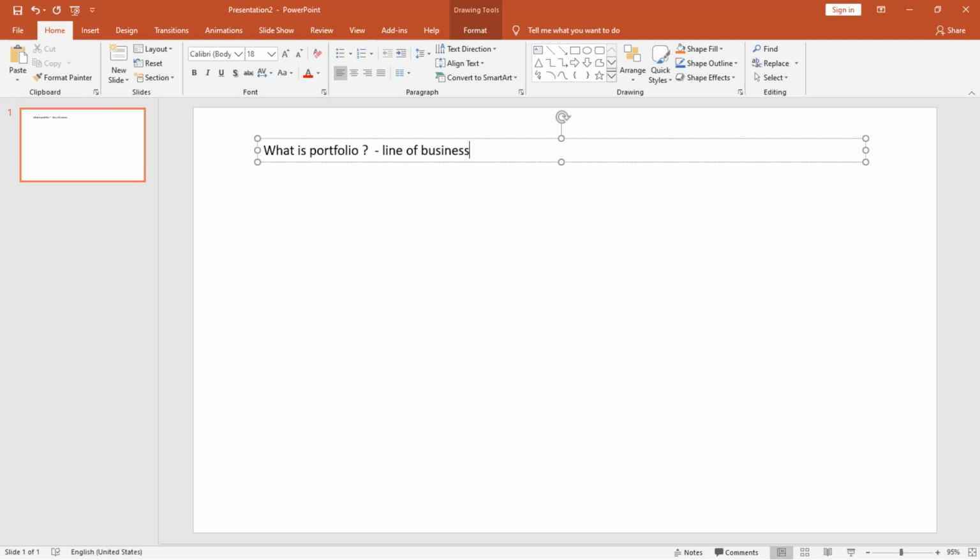Now there will be an estimated effort. There will be a duration of the project associated with this. There will be a start date. Let's say I will start on 1st of March, and I want to finish this by 1st of April 2022. That should be the end date. Now, based on the resource cost, how much the labor force costs you, how much the materials cost you, everything, you will try to prepare a planned cost for this particular project.